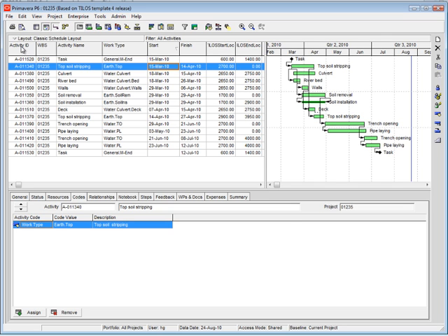All the start and end dates are taken directly from TILOS, including the different calendars which they might have assigned. TILOS link recognizes the different activity types.